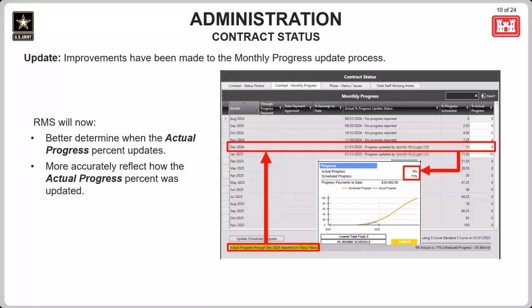So when we go out on Thursday, it is going to show that the numbers are 0 because those are future. They haven't been set in stone at this point in time. But when it's reporting on the graph, it's going to stop with the last reported set of data. If you look at the slide that's showing right now, you can see that the blue line stops just before January of 2025. It stops having data at that point because that's the last reported data.